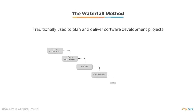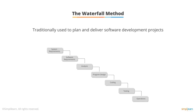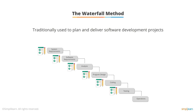Here we can see what it might look like to manage a project using the waterfall approach. The system and software requirements would need to be identified and documented up front, followed by the necessary analysis and program design work. Then comes the actual coding and testing, followed by the handoff to the customer or to operations.